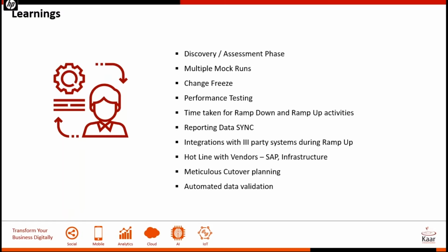And then I cannot stress enough the importance of multiple mock runs. Why are multiple mock runs required? The first time, you take a copy of development, put it into the sandbox, and do these tasks. Possibly the first conversion could take 3 to 4 weeks. And then when you do the development, it should take a shorter period. And in this period, you're already adapting your custom code.